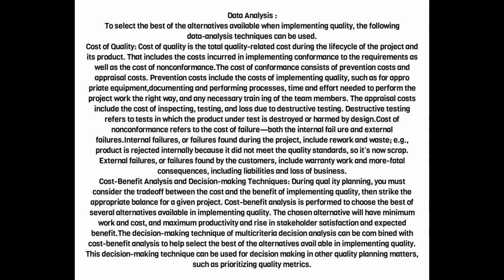Data analysis. To select the best of the alternatives available when implementing quality, the following data analysis techniques can be used. Cost of quality. Cost of quality is the total quality-related cost during the life cycle of the project and its product. That includes the costs incurred in implementing conformance to the requirements as well as the cost of non-conformance. The cost of conformance consists of prevention costs and appraisal costs.